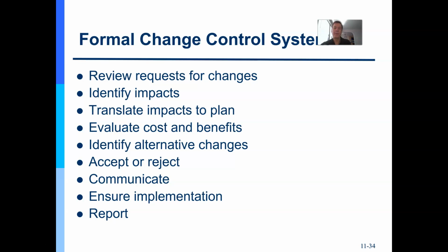Okay? So have a formal change control system. Should have at least 3 parts. A change control system describing what you're going to do. Change control board with members and who votes and who doesn't. And a change control log to record it and communicate it out. But the reason I have a change control system is not every change, if it's a massive project, needs to go to the board.